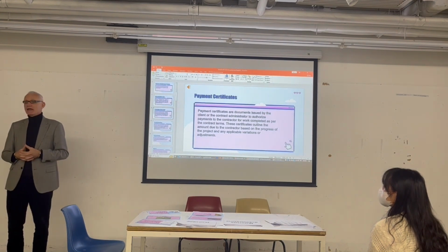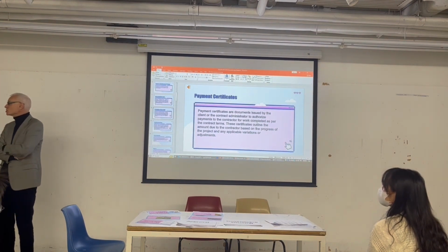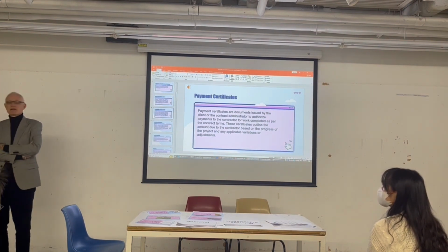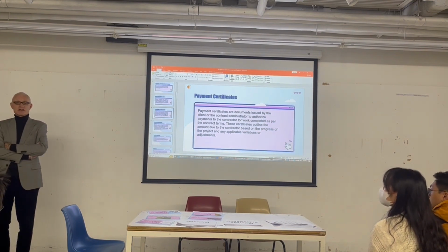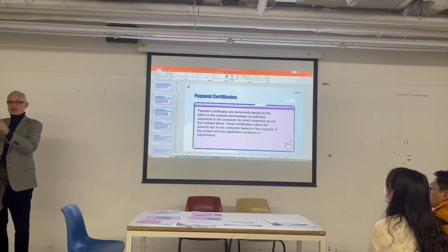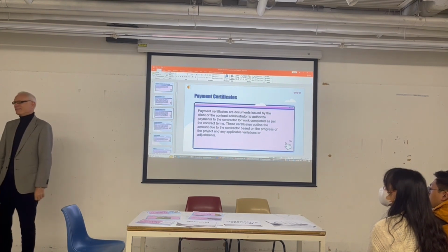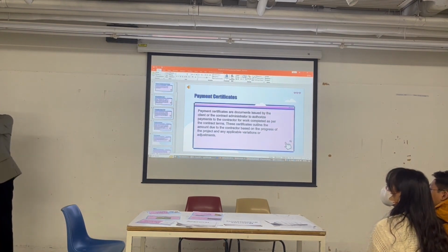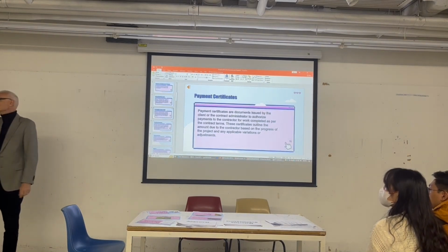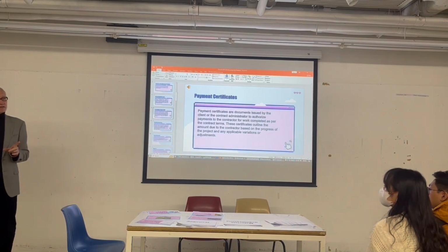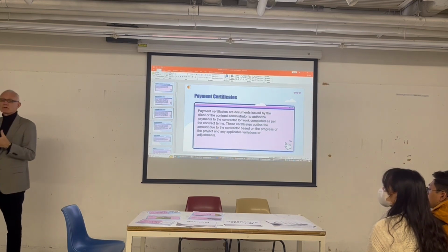And the contractors will all play a game. So maybe something's happened and you've made a change, a variation, and they turn around and say, okay, yeah, that'll take me 5 extra days on the contract, extension of time, and it's going to cost this much extra, a variation in cost. And then you think, hold on, wait a minute. No, if you change that round and did that, you could still get it done in the same time. And perhaps you don't even need any costs. So you have to understand how the contractor can do things to meet the time and cost. So you need to have that experience.